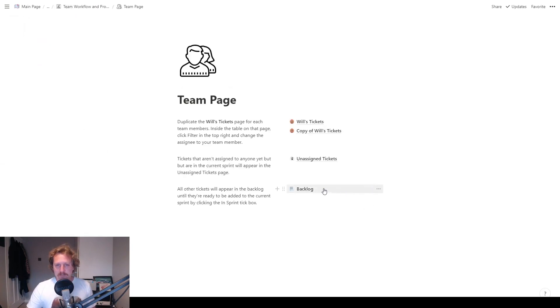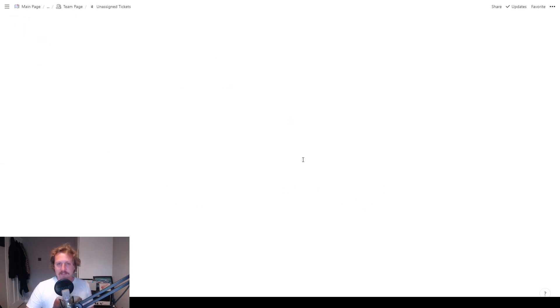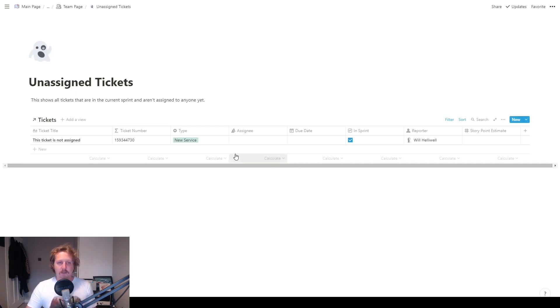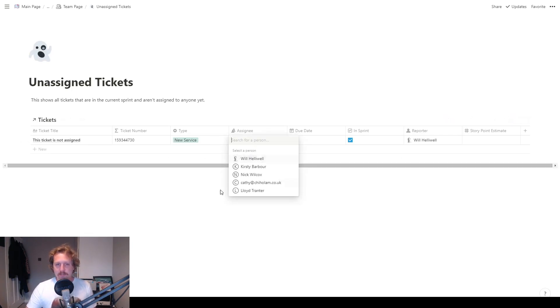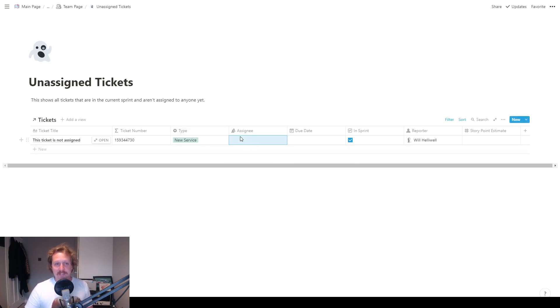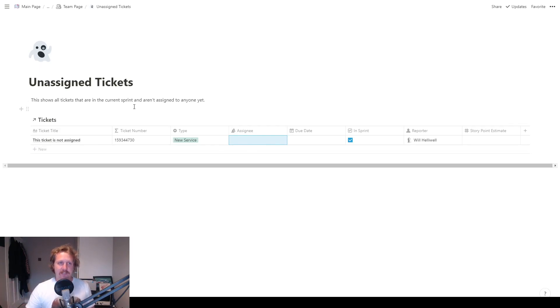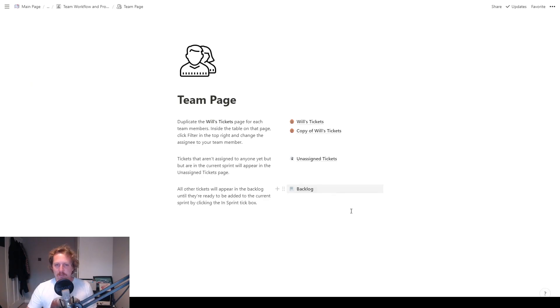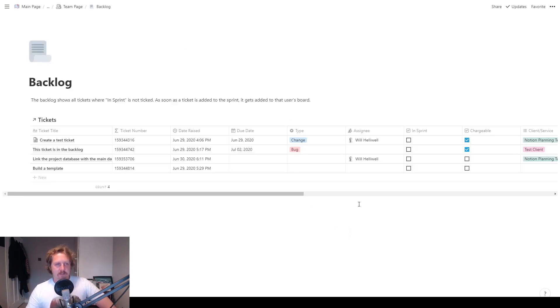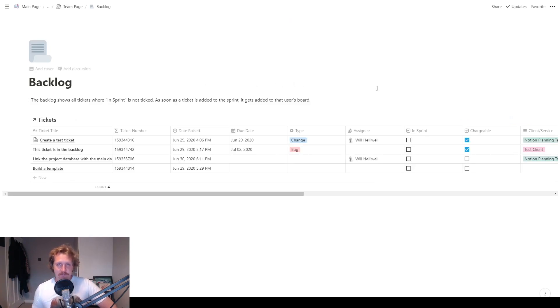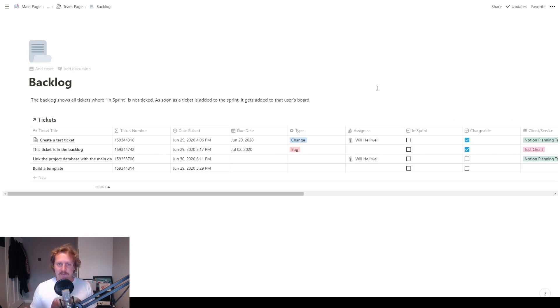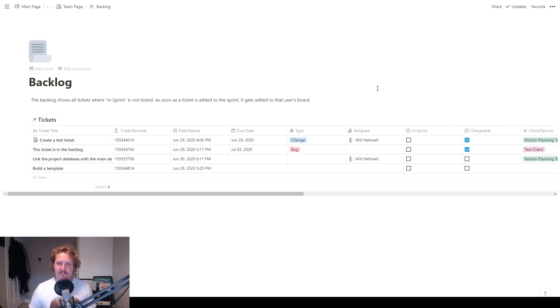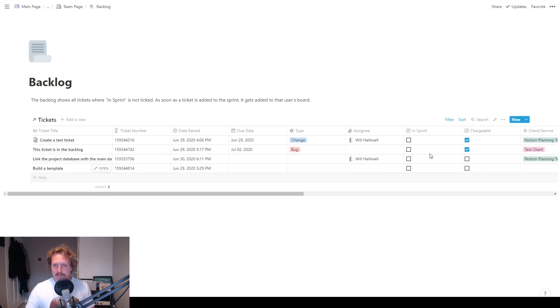Let's go to unassigned tickets, obviously tickets where this ticket is not assigned. So if I put somebody in there, we've got a couple of names in there. If I put someone in there, then it would come out of this section and go to that team member's page specifically. And then the last bit here is the backlog. So the backlog shows all the tickets where in sprint is not ticked. And as soon as the ticket is added to the sprint, it gets added to that user's board. If it's assigned, if it's not assigned, it will go to the unassigned page.